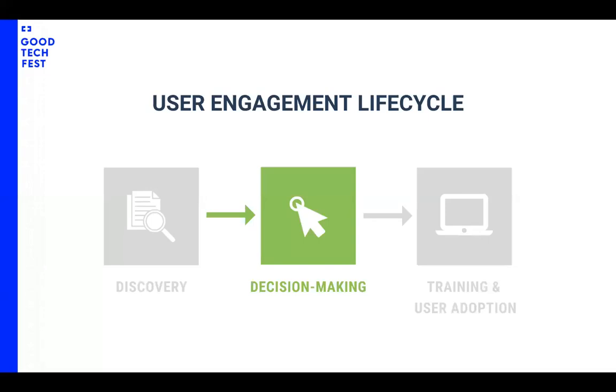And so what we did, we split our development and rollout into 3 phases spanning over 3 years. We are in the last phase and hopefully should conclude by the end of this year. This way we were able to do it in manageable bits without disrupting our services. And it's also given us a lot of time to test out the solution after every phase and give our feedback to Vera and to make the necessary changes to the design before we embark on the next phase.